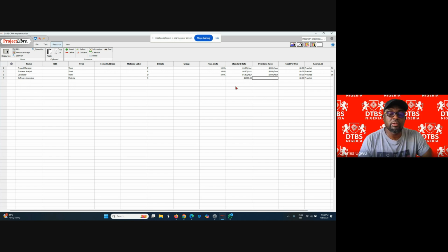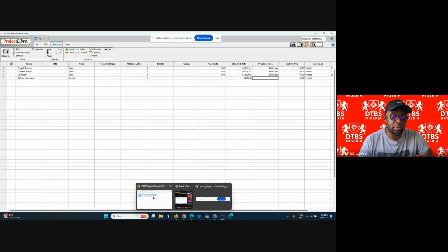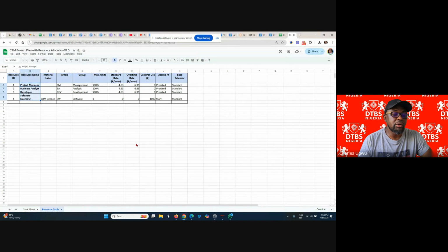And we agreed on overtime. It's up to you people to agree on overtime. If there is overtime, how much are you willing to pay a group? It's part of the resource planning. In our own case here, we agreed it's going to be 6.95. For instance, if we choose for them to work on the weekend, we say that everybody should be coming on Friday, Saturday and Sunday, because it's a special day, weekend. They're making sacrifices. So that's what I mean by overtime.